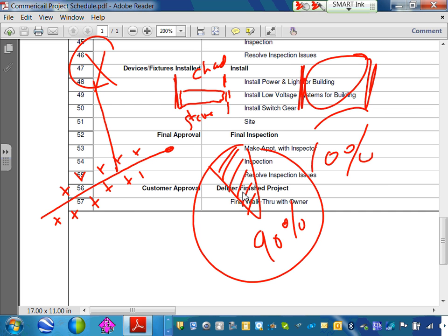Cool? But this is your plan, what we're going to do. You keep track of it as you go. And they do have two Gantt charts, guys. One the plan and one the actual. And they put them on top of each other, and you can tell the resources and time. Are we on track? Yep, we're good. That's how you manage a project. You can't just wait until the end of the project. Oops, we're $2 million in the hole. Okay, so let's everybody understand the gravity of this. Okay, now let's go and start it.